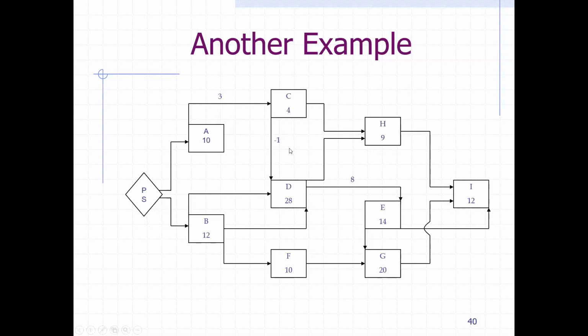The reason I wanted to bring this up is because we have here something kind of new, which is the -1, and also the simultaneous start between C and D. This is something kind of new to you also. So that tells you D can start a day minus the starting day of the C. This is kind of new to you.